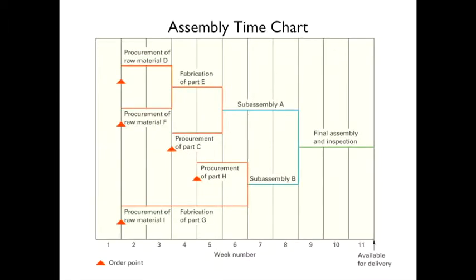Here's an example of an assembly time chart. You work backwards when creating this. It takes three weeks for the final assembly and inspection. Assembly B is faster than assembly A, so you don't have to start it until later. Some parts take longer to procure and fabricate. This chart lays out when you have to order things so that all components are ready when needed.